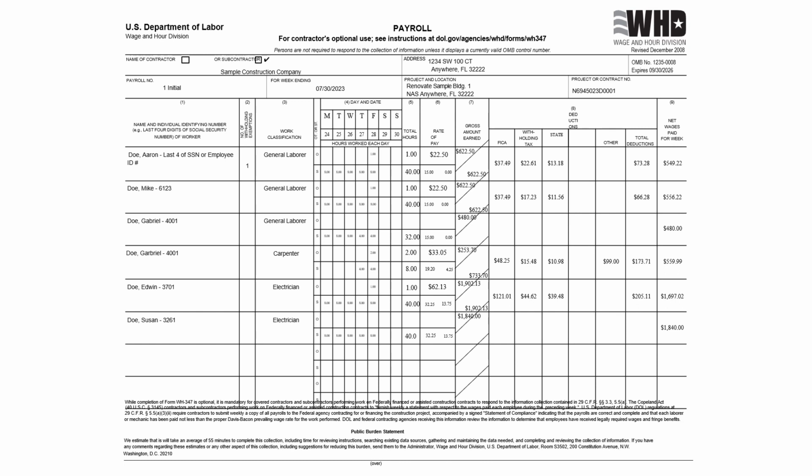Block 7, specify the gross earnings for the hours worked under the contract in the top half if part of the worker's weekly wages was earned on projects other than the project described on this payroll. Then enter the gross amount earned on this contract in the top half of column 7. Enter the gross amount earned on all jobs during the week in the bottom half of the diagonal line.